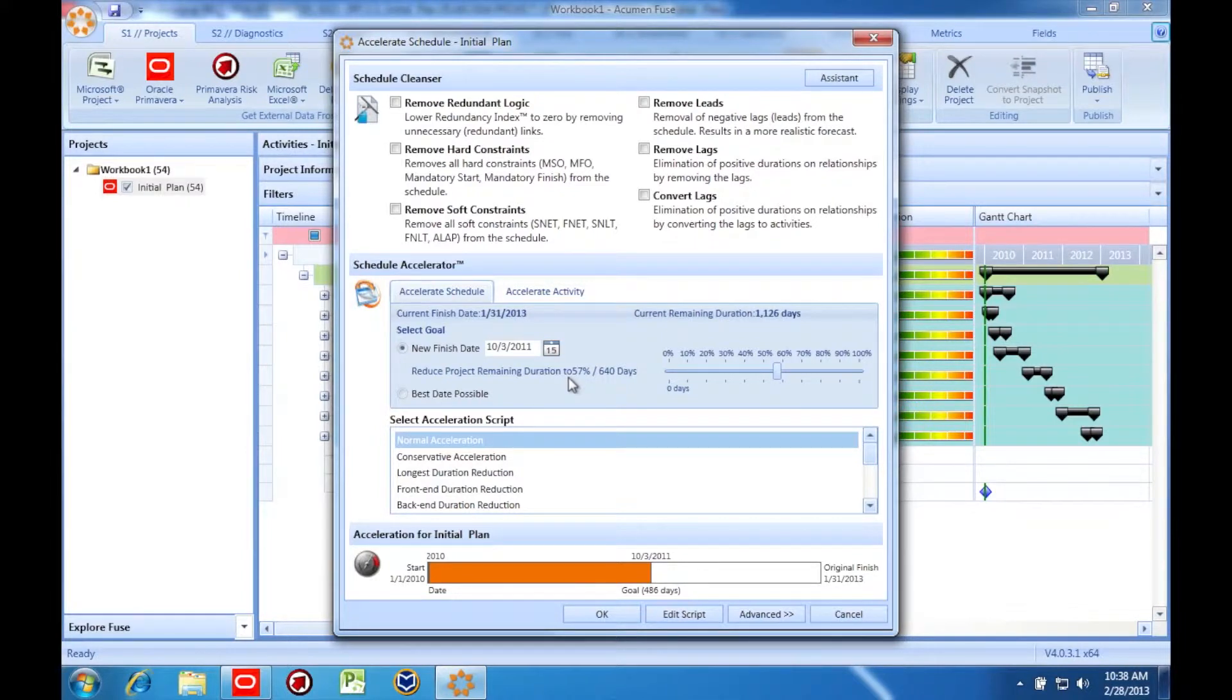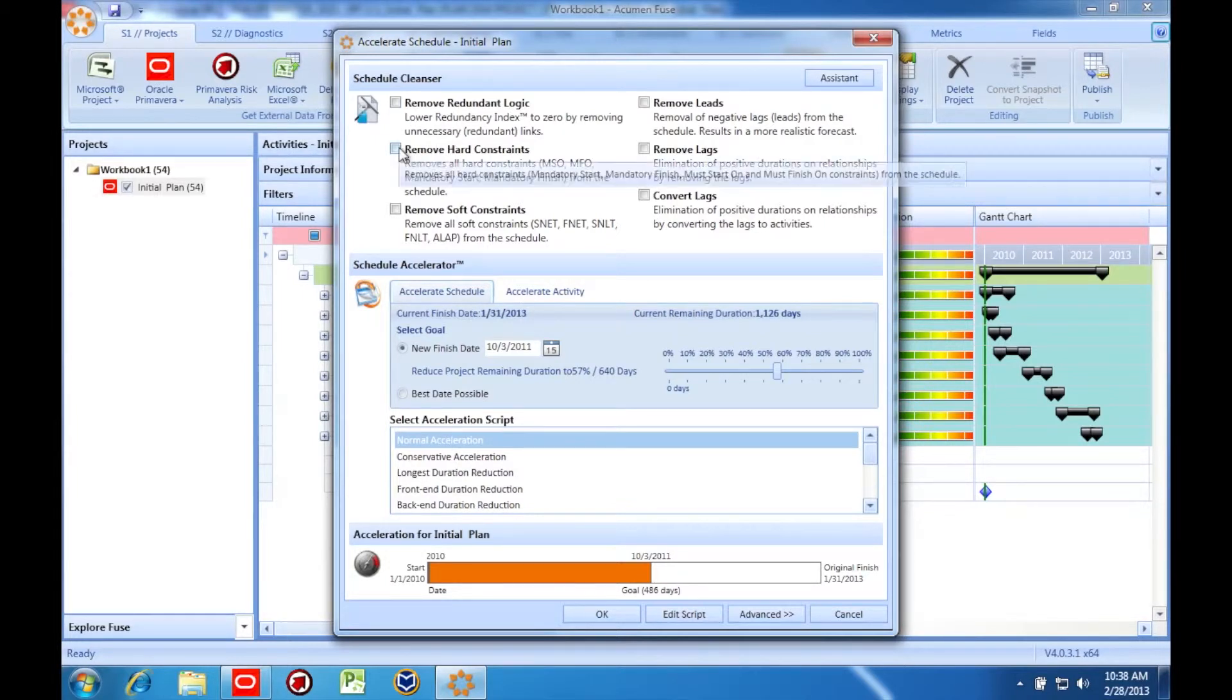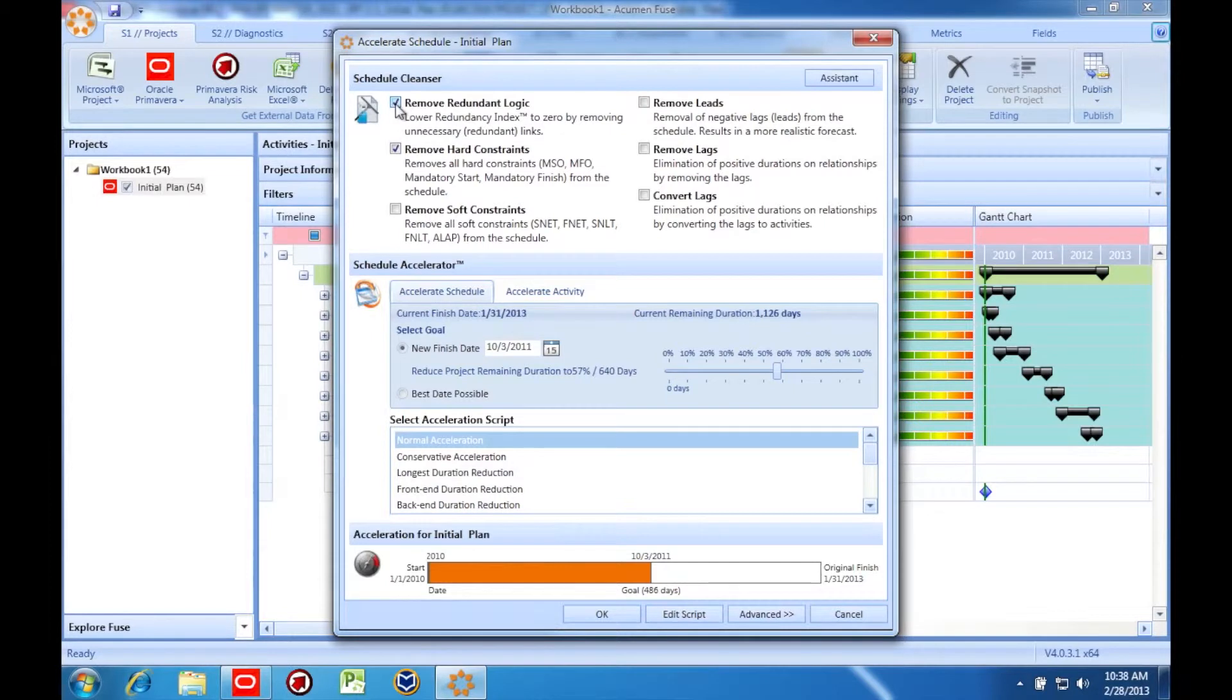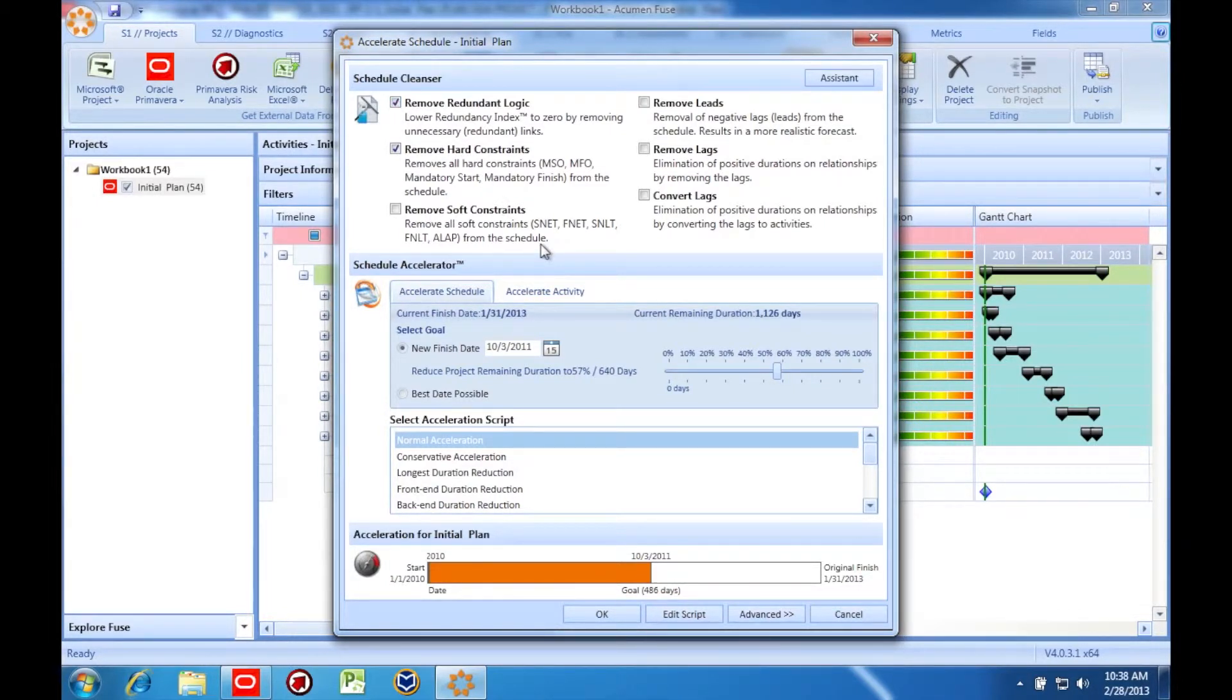First, you might wish to remove hard constraints and other limiting factors from the schedule. Acumen's schedule cleanser helps you do this quickly. Hard constraints and redundant logic, for example, prevent smooth flowing logic in the schedule and will definitely inhibit the ability to accelerate the schedule.